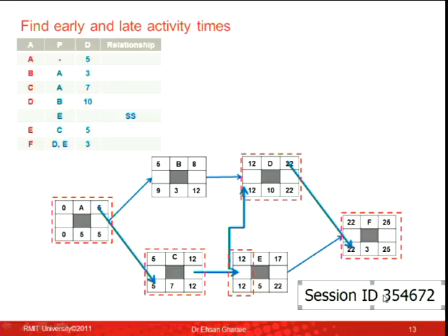Get it? So when you've got start-to-start, finish-to-finish relationships, this might happen. It's not always the whole activity that is critical. Sometimes the start of the activity is critical. Sometimes its finish is critical.